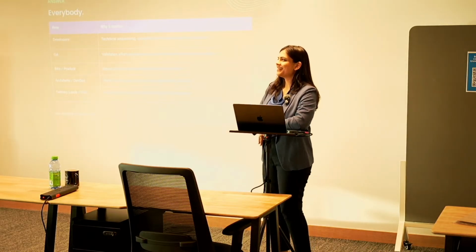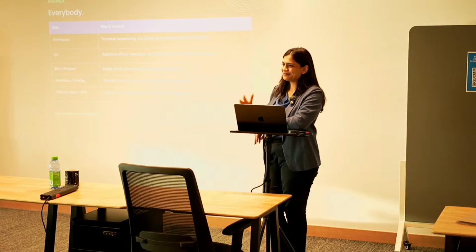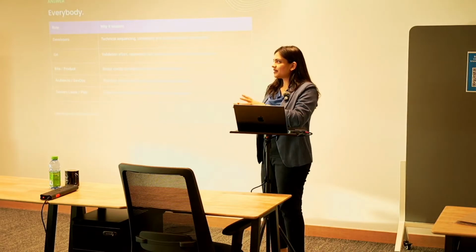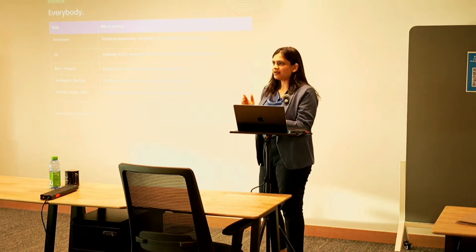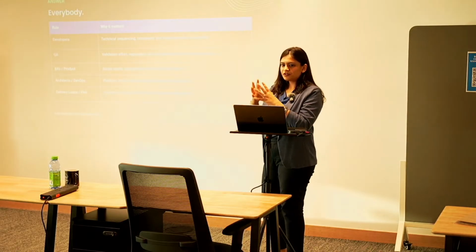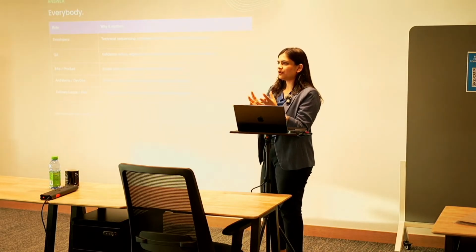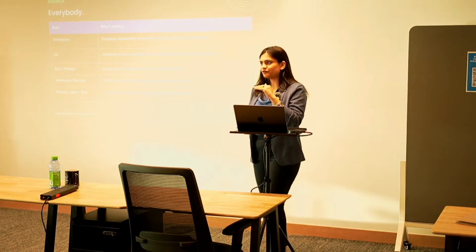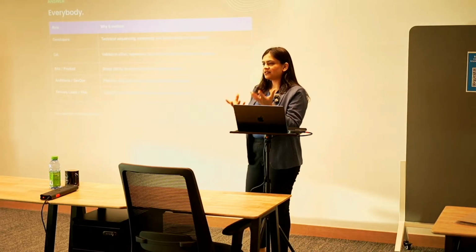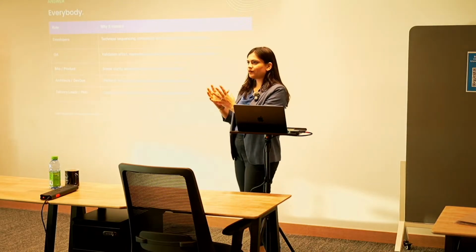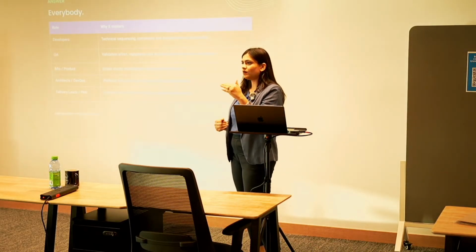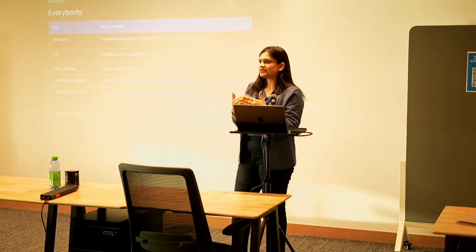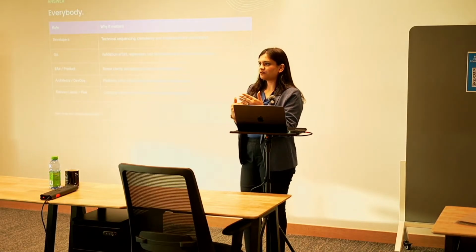That's a very interesting question, and I feel that deserves a meetup topic of its own because prioritization in itself is a huge beast. But I'll try to take a stab at it. Prioritization cannot happen at one point and stop after that. It has to keep happening time and again. The first round of prioritization happens usually when you're doing either a discovery or an inception. The output of that is a product backlog, which is a set of stories or tasks which define the scope of work. Then you have a round of prioritization on what the product backlog looks like and what the sequencing of that is. Typically the framework that we use is doing a relative comparison of the items there.